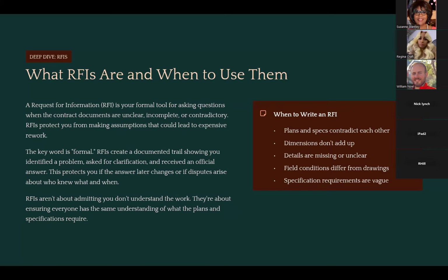But you really need to have a sense of, hey, when am I just talking about a method of how I should do something versus when am I talking about something that is going to contractually obligate me to do something? And if it's the latter, you really want to formally document that question with an RFI. And there are multiple ways to do this.